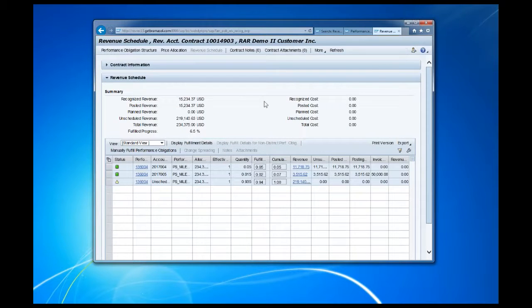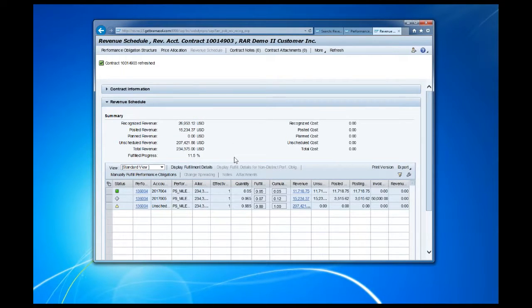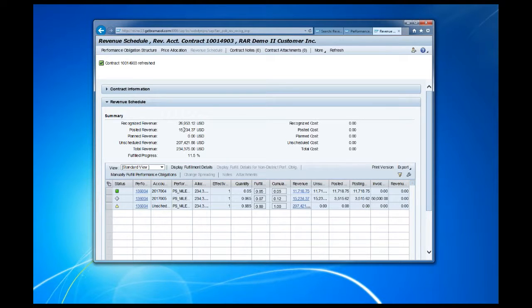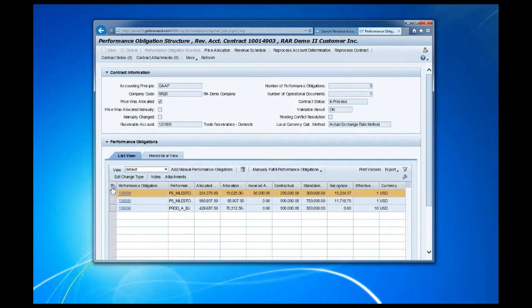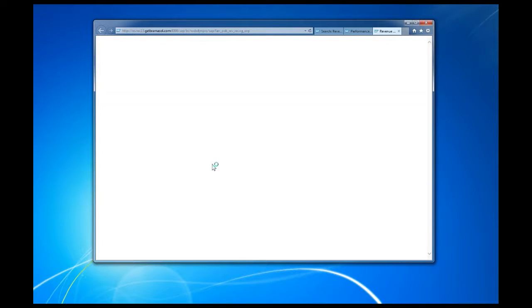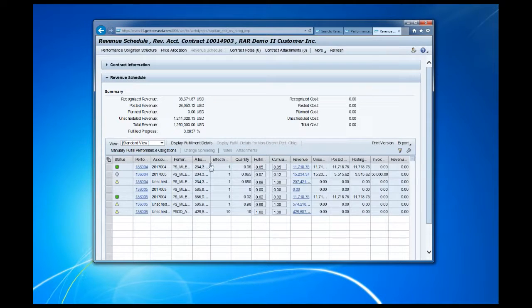If you remember, this was at 6.5%. After refreshing, you'll see that this now changes to 11.5%. Although I've done some postings for this in this period, you notice that it's changed the status to gray — meaning there's some revenue to be posted, but it hasn't been done yet. So you can see the distinction here between recognized revenue and posted revenue. Backing up one view, I've got a new key performance value that shows of all the performance obligations in this sales contract, here is the recognized revenue, here is my posted revenue, and on the overall million-dollar contract I'm about 3% in based on the revenue postings.